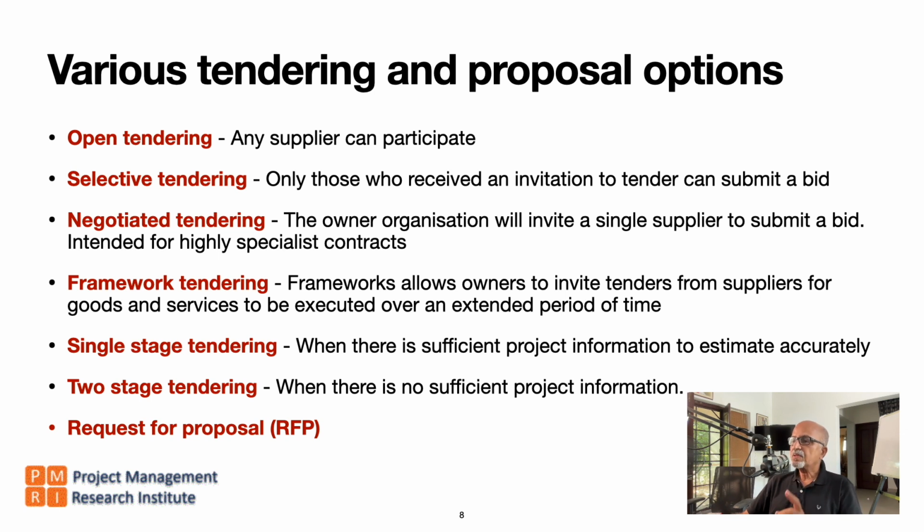So we choose one single potential contractor, invite them to tender, then they submit the bid. Then we get into the negotiation process and then finalize it.